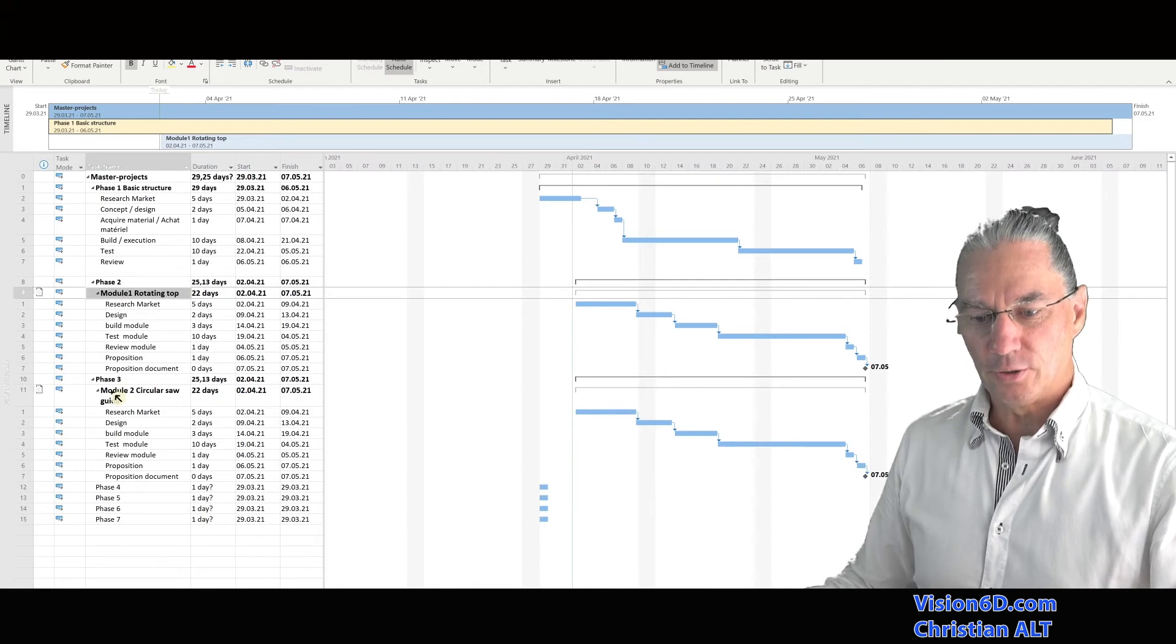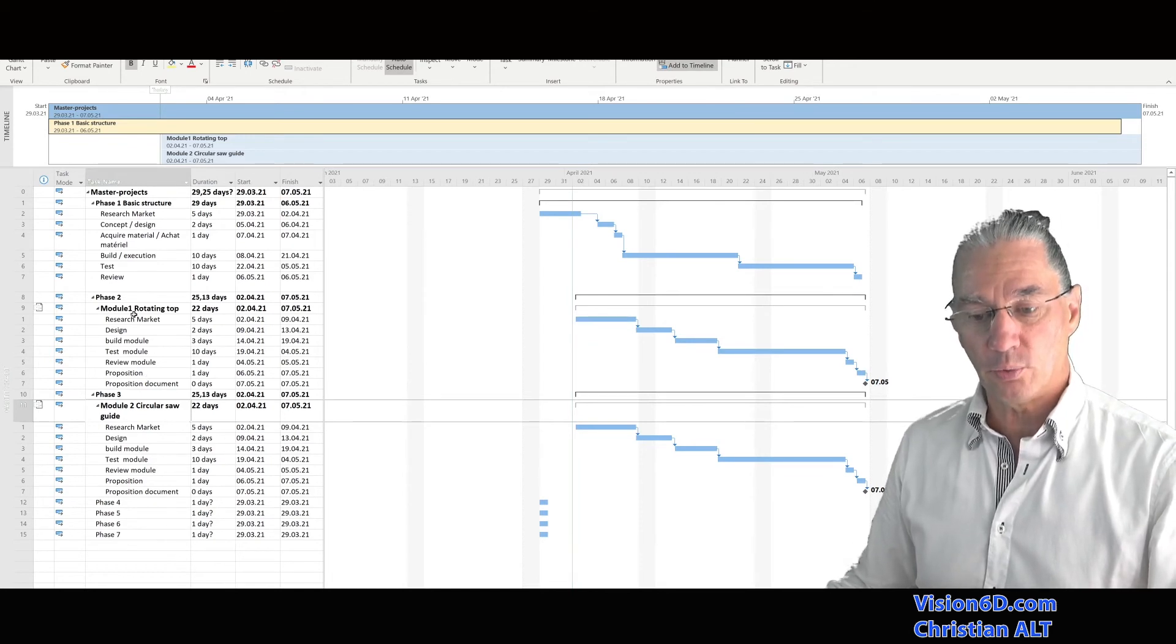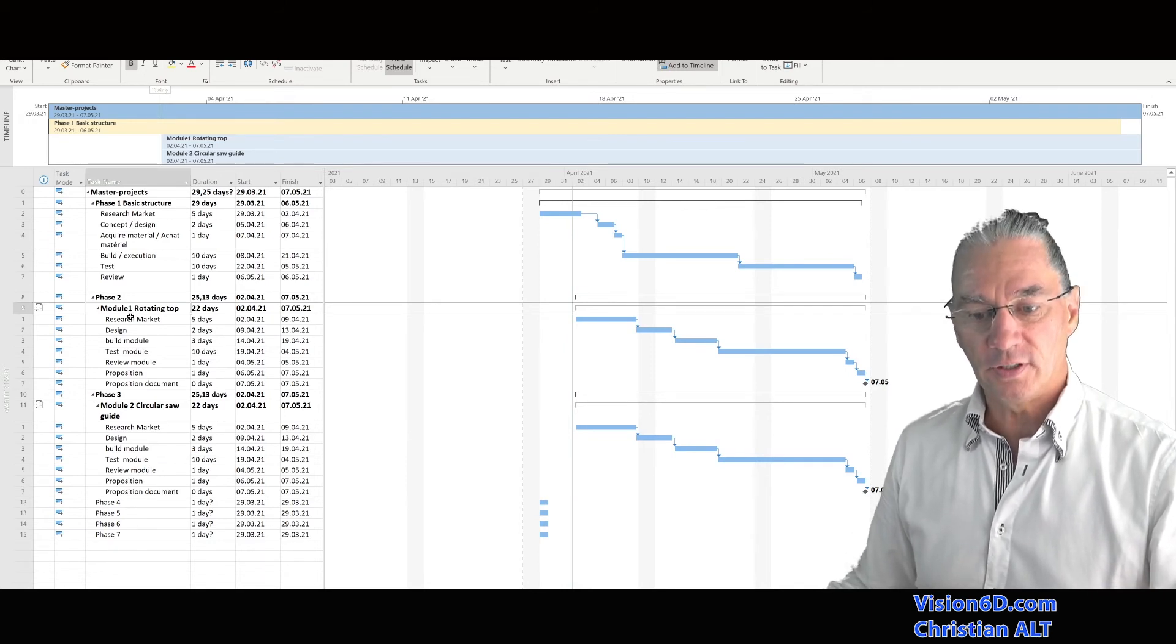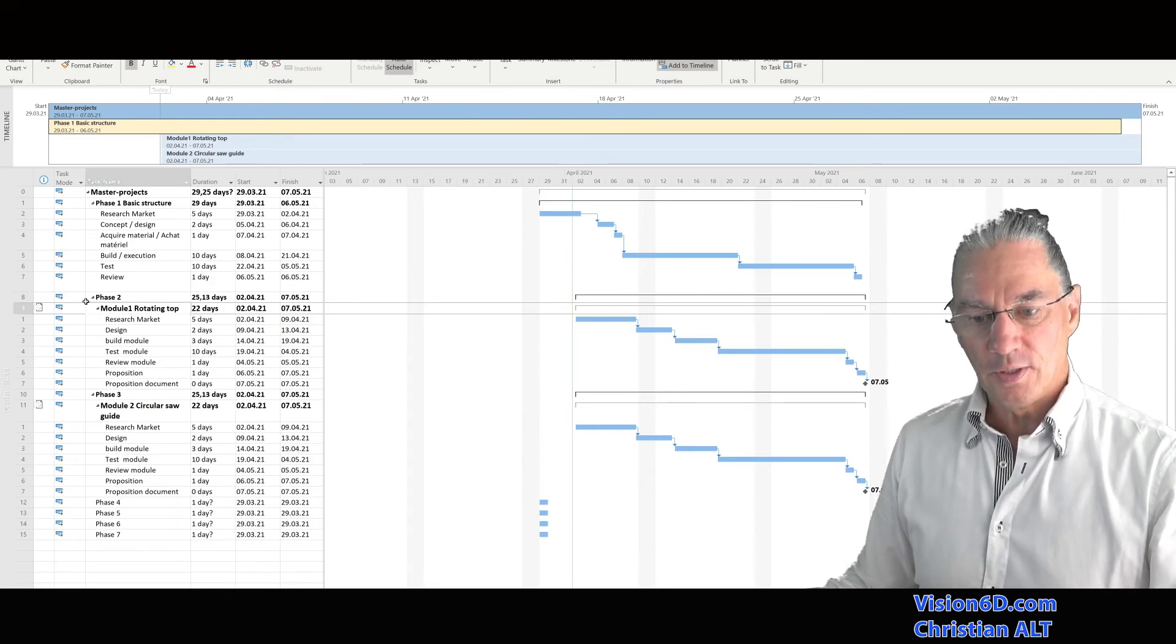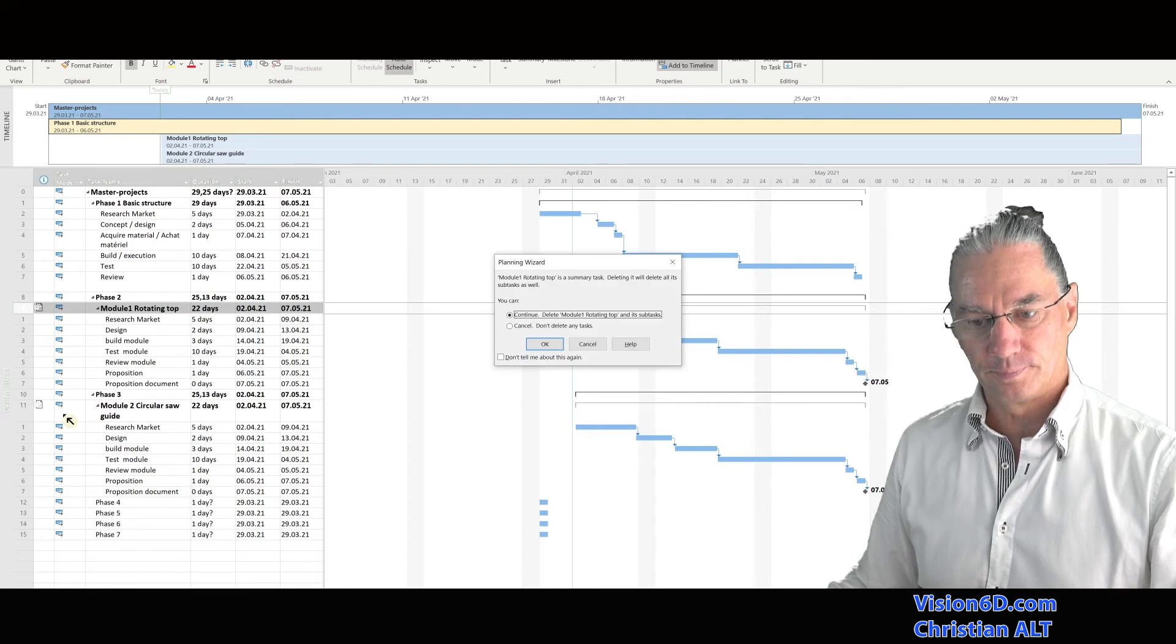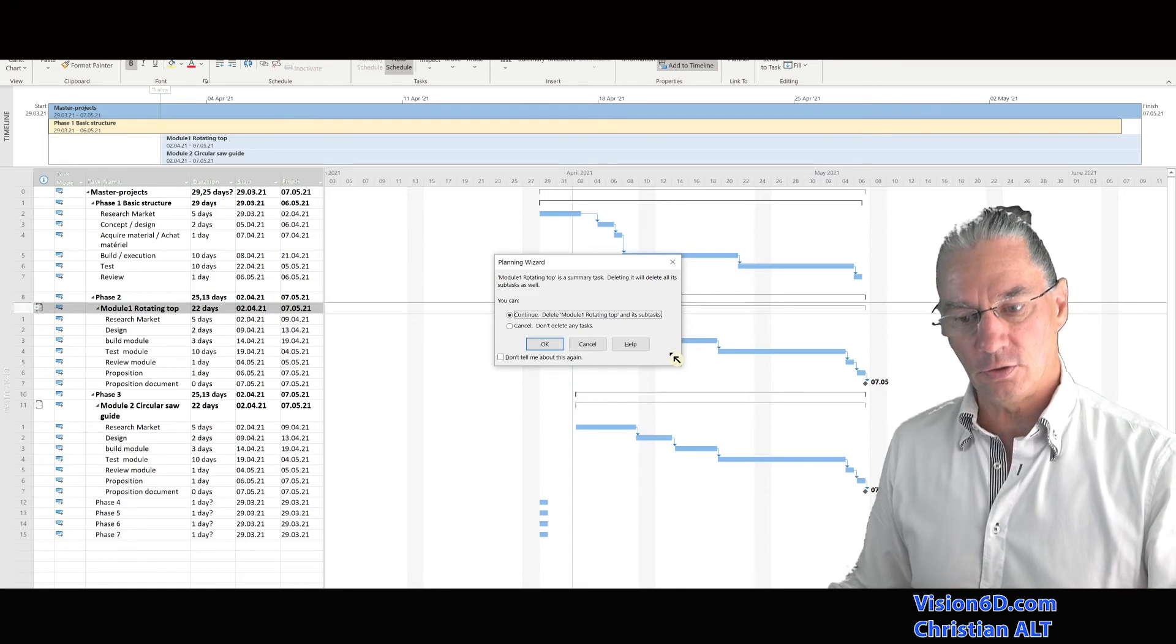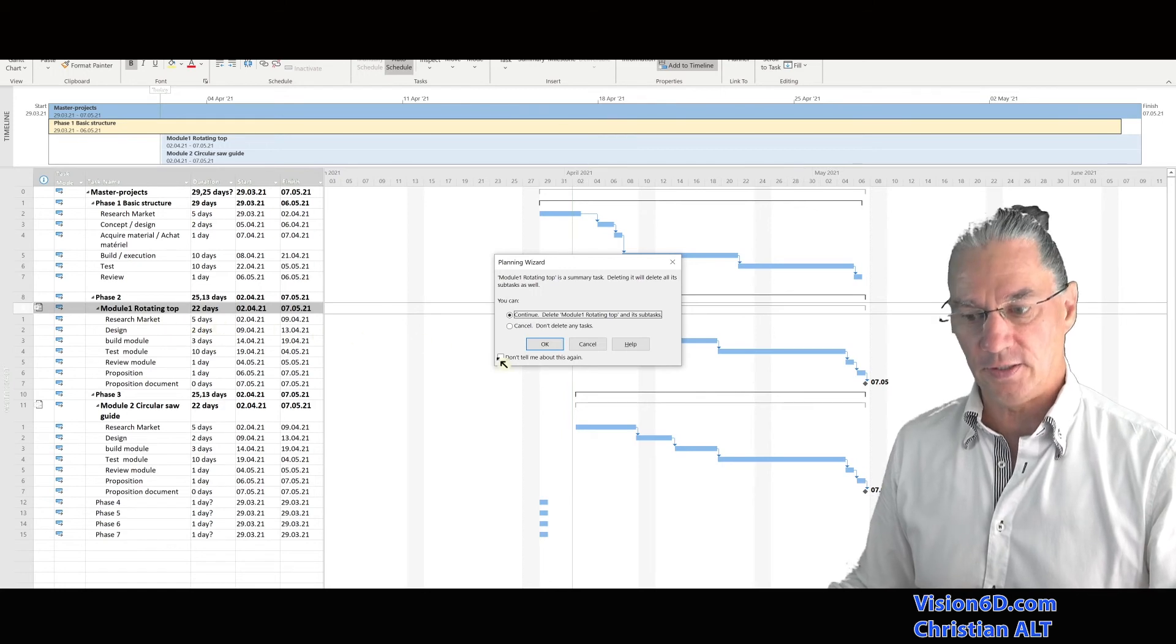I'm going to add also the second module here to the timeline like that we are complete. And now we can take a situation where we can say that, for example, the first module, we didn't really need it. So we haven't done this and I would like to delete it from the master file. So to do that, you see that I selected the complete line which entails the link to the file, and I'm simply going to say delete the task. And here, MS Project is warning me that if I continue, it's going to delete all the tasks which are below module one rotating top.